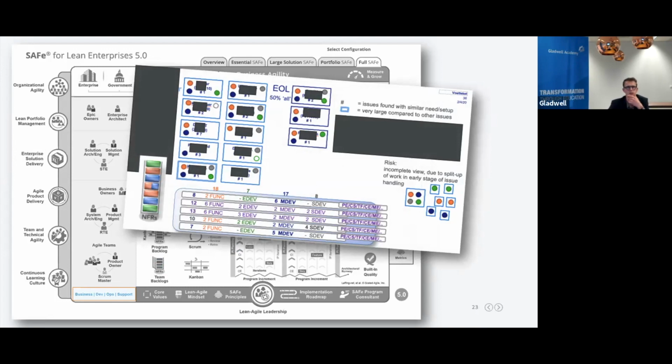What we did is to identify different types of work. We defined some features, and we defined different competencies that were needed to deliver that feature end-to-end, symbolized by colors. And based on the colors, we could see which different competences are needed per feature. And based on that, you can derive a kind of typical team setup. So this is just an example of how to reorganize a little bit.